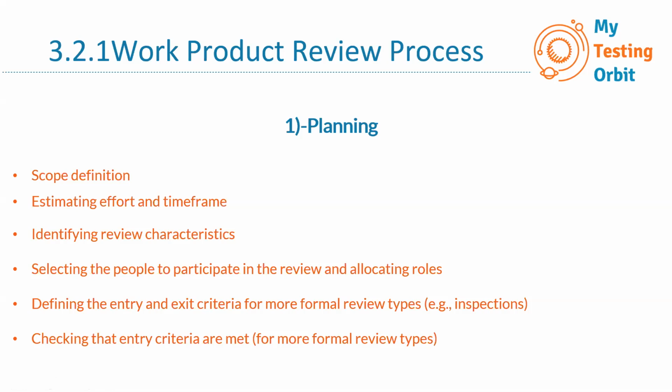For example, if it's a test plan, we do mention entry and exit criteria, that is, what is the entry criteria for testing to begin. So we can say that the prereqs can be that the development is done, or the code is stable, or the requirements are stable, or the requirements are signed off, we have a test environment. Whatever applies to the entry criteria of the testing of that project, we identify in the test plan. So that's the entry criteria.